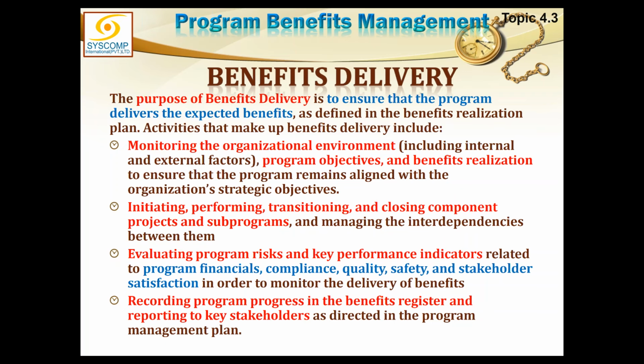Number two is initiating, performing, transitioning and closing components, projects, and subprograms as and when a component is done. We start a component by initiating it, giving it a charter. It goes into execution, and then it yields the product, and that product is converted into the benefit, and then it is transitioned. Ultimately, the component gets closed, but the benefit remains, and managing the interdependencies between these components.